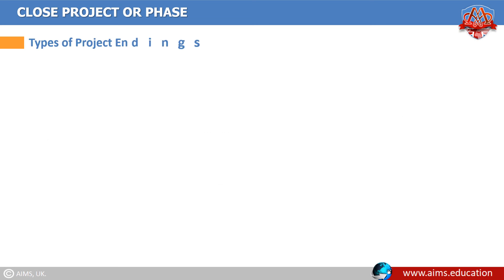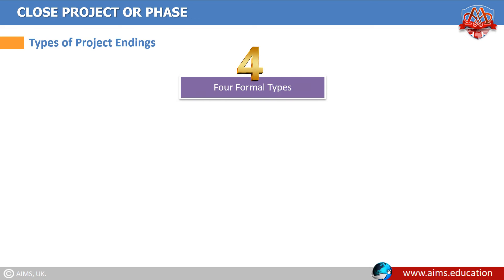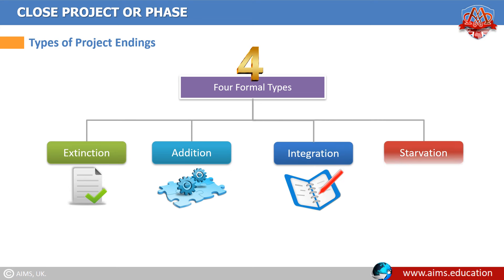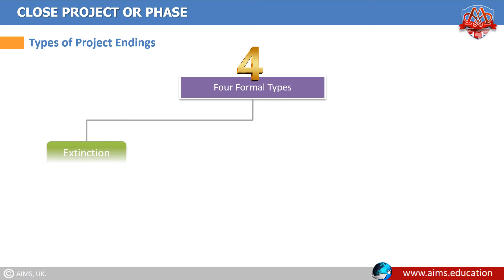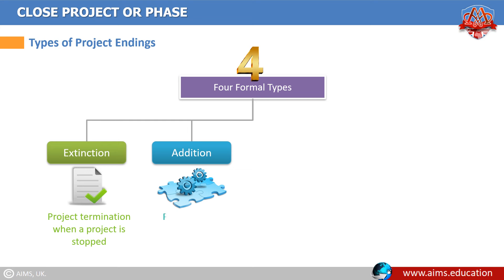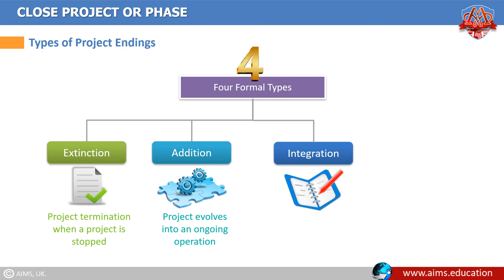Types of project endings: there are four formal types of project endings — extinction, addition, integration, and starvation. Project termination by extinction is when a project is stopped due to either its successful or unsuccessful conclusion. Addition is a type of project ending where the project evolves into an ongoing operation. Integration is a type of project ending where financial or human resources assigned to the project are diverted or reassigned elsewhere in the organization.